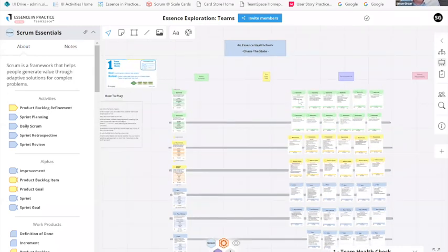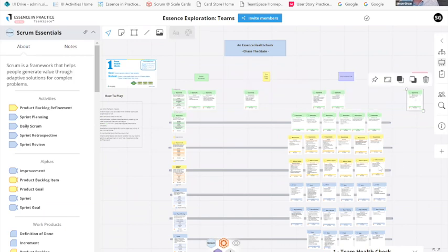If where we are is in this second state, we want to achieve this next state. These states are states we've not yet achieved. We might actually decide that final state, and the best one for this actually is software system. The last state in software system is retired. It might be that this team is not responsible for taking the software system into retired. So we can say, which states do I not care about? So this gives me an idea of what I've achieved, what I'm working on next, where I'm going, and what's not my responsibility. So it gives you quite a clear view of your kind of roadmap of state achievement.